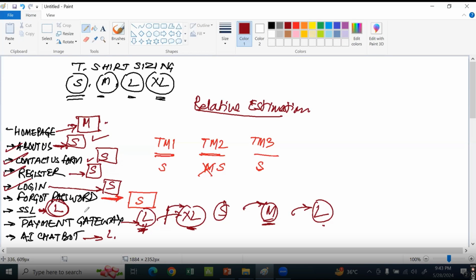No, they're relatively the same. So we do not want to be accurate. We want to be relatively accurate. So that's why we talk about relative estimation. You just have one reference of small, one reference of medium, one reference of large, one reference of extra large, job done. All I have to say is, is this user story closer to this, this, this, or this? Job done. I can classify that user story as small, medium, large, or extra large.